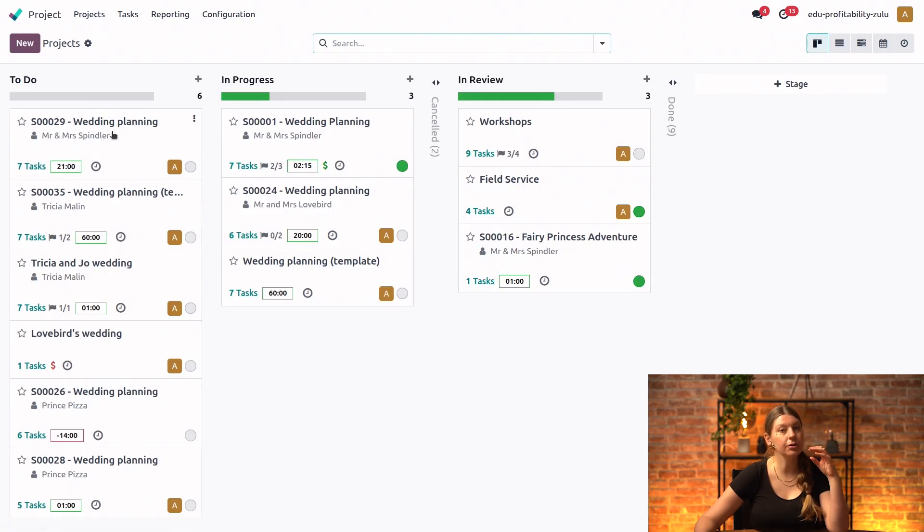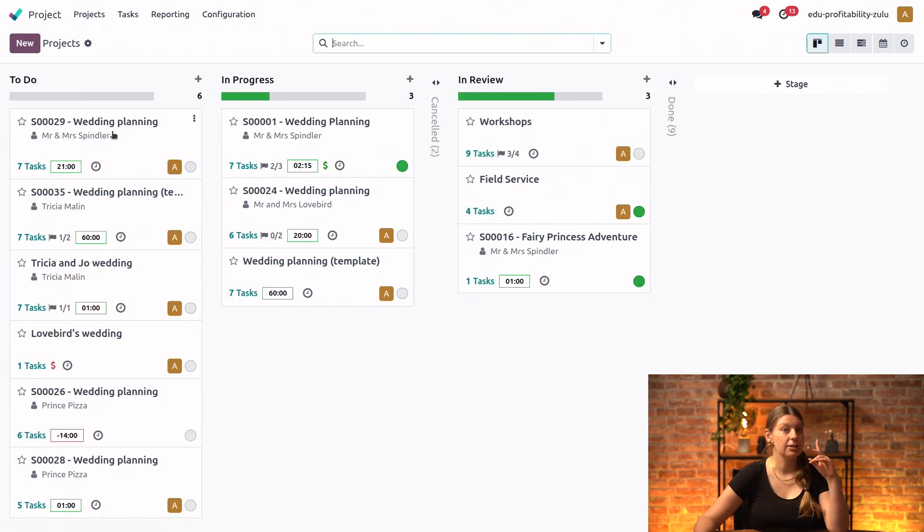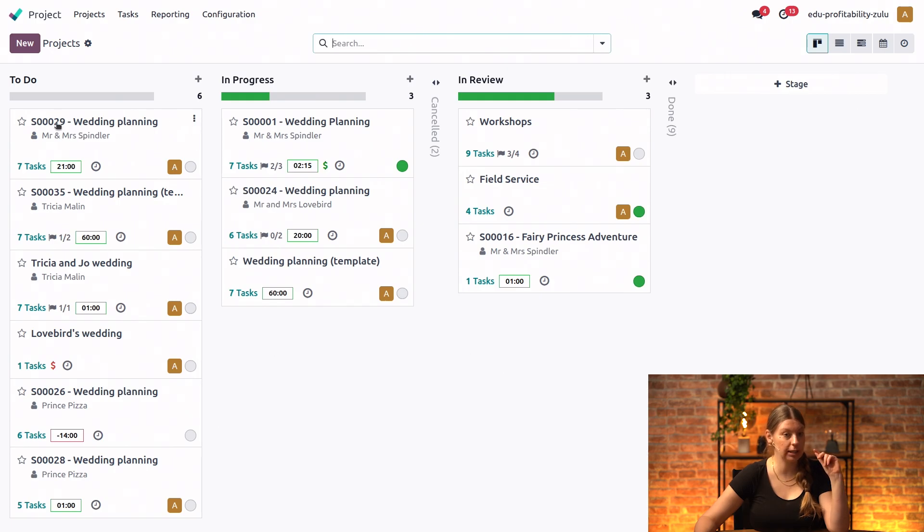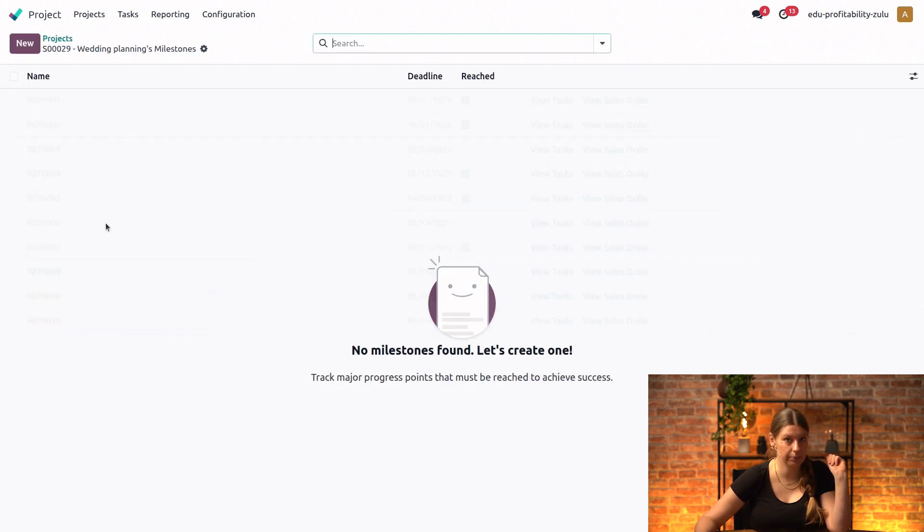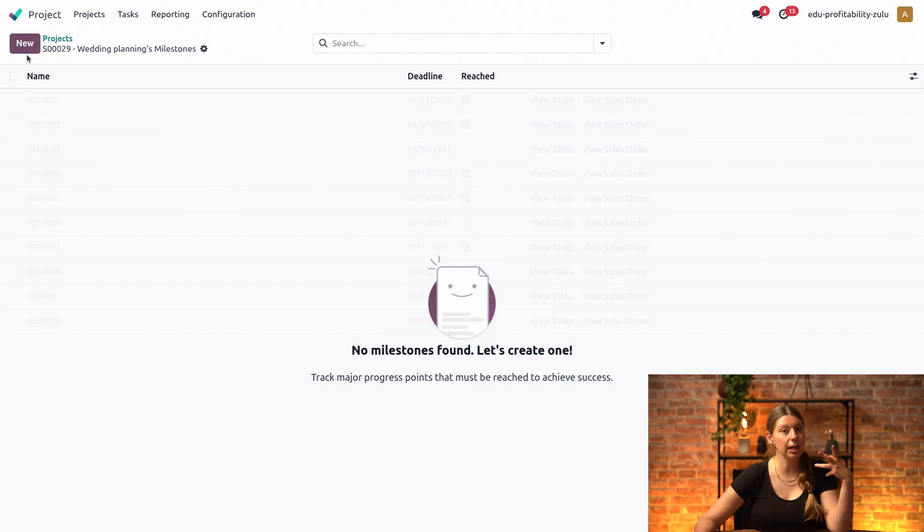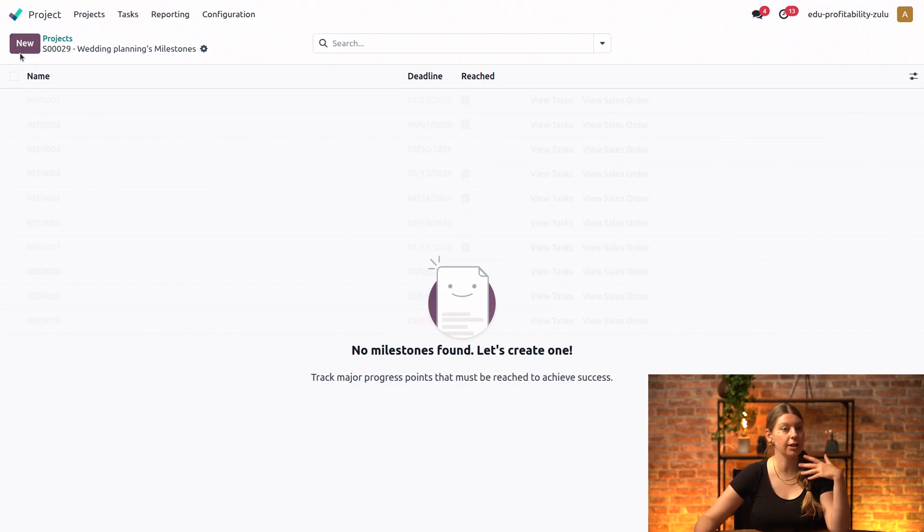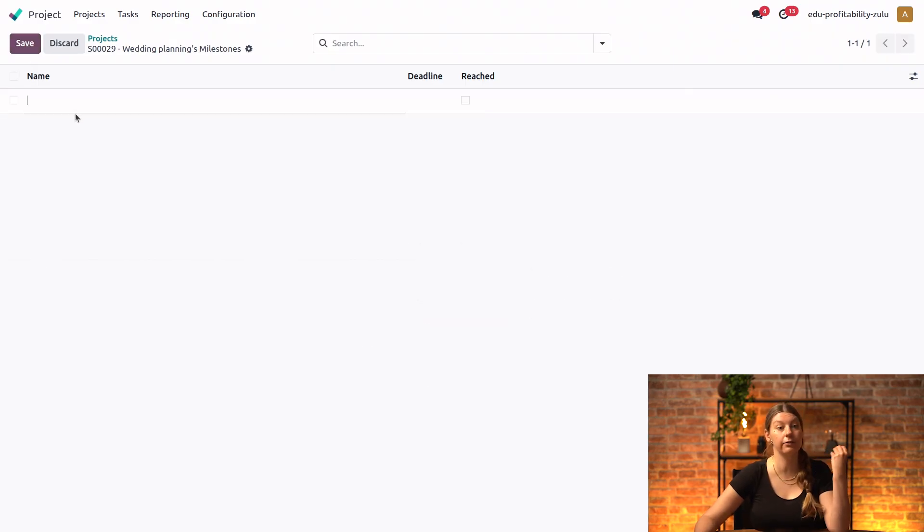Something to keep in mind is that milestones are project specific. So let's go ahead and create two milestones for this wedding that we're planning right here for Mr. and Mrs. Spindler. We'll click on the vertical ellipsis and select milestones. So our first big accomplishment of this project is actually booking the venue.